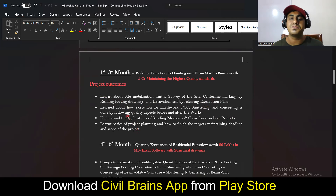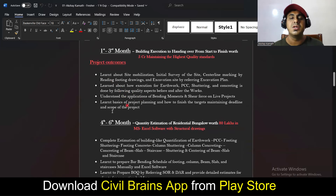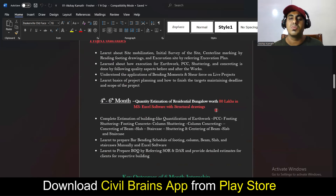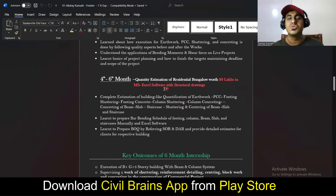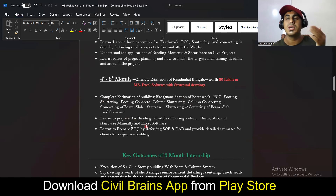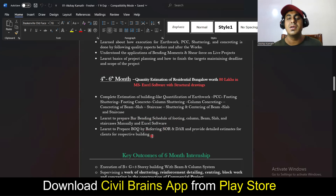You can add or delete points based on your knowledge. In the fourth to sixth months, we worked on quantity estimation of a residential bungalow costing 80 lakh rupees using MS Excel and AutoCAD. We did complete estimation — excavation, footing, column, beam, slab, staircase, brickwork, plaster, and everything. I also taught how to prepare bar bending schedules for footing, column, and beam, how to prepare BOQ, and how to refer SOR and DSR.